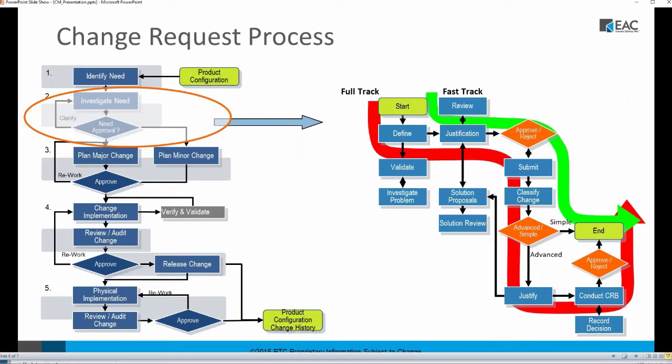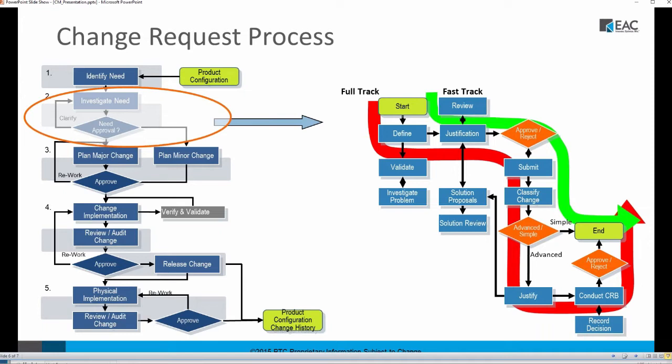So as I mentioned before, there's kind of a full track and a fast track for doing change management. The fast track, like I said, you alluded to earlier, probably about 80% you'd want to do that. Full track would maybe be something that involves more people, might involve some other groups, and also might include maybe testing or getting input from other places that typically wouldn't take place in a fast track change scenario. So both of those are defined, and you can choose when you create a change which one, which path you want to take.